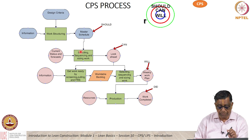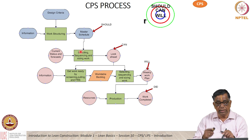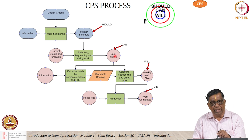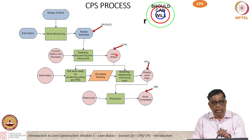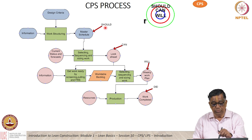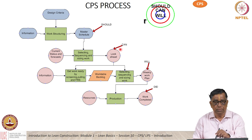When we come down to sequencing work and understanding the work better, we come to the look-ahead planning. In the look-ahead planning, if you are able to identify and remove the constraints, we say at that stage we can possibly do the work. So the client has told us we should do the work, and we say yes, we can probably do that.